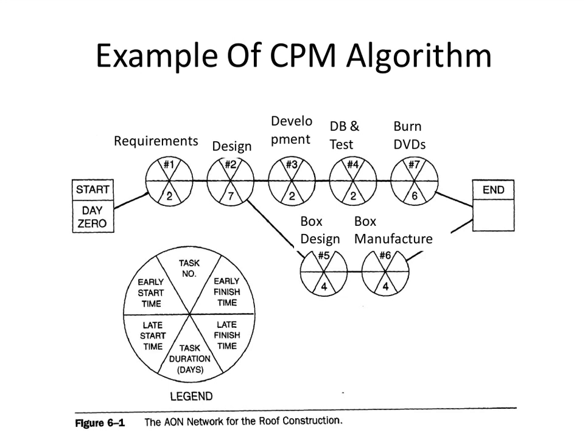It's the one you got to make sure that things are getting done on time, because if they ain't, it's delaying that project. And if something ends up taking a lot longer than expected, like node 5 here, you could find that now you've got to really pay attention to node 6. And that if you take your eye off the ball with node 6, you are going to be delaying that whole project. Does that make sense?